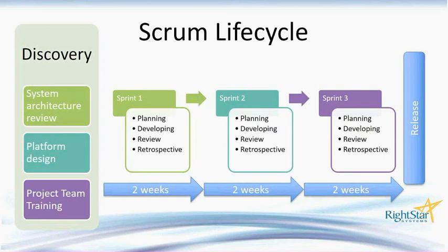So you have this every 2 weeks, or whatever time frame the organization determines is appropriate. During these sprints, you are developing, and it's possible that at the end of the 2 weeks, the requirements may shift a little bit, but you're never more than 2 weeks away from being able to make adjustments. So it's not like you've gone away for 18 months and then kind of climb out of the hole and find out that you're completely misaligned.